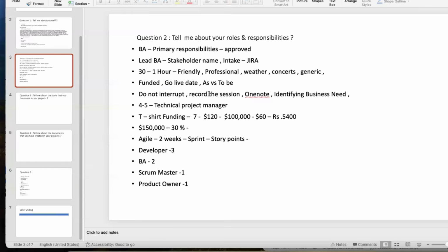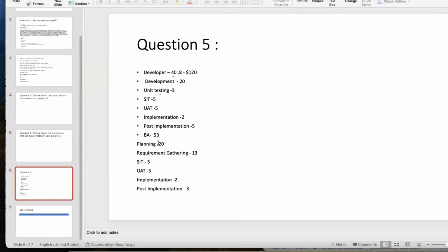See, I wouldn't say this is a picture-perfect LOE, because you're going to add a 30% buffer. We never know, because after a couple of calls you are doing the t-shirt size, right? This is not an exact LOE. It can go higher, it can go lower. But if it's going higher, you need to justify why it's going higher, what is not covered in your initial request, and what you are covering now, what kind of development. That's even more of an issue. That's why for the first LOE that you submit, please add your points extra.